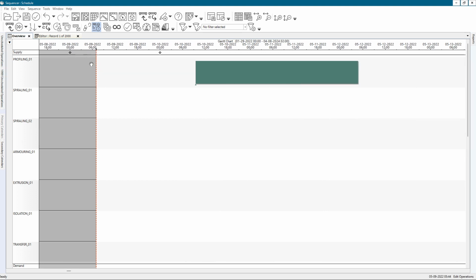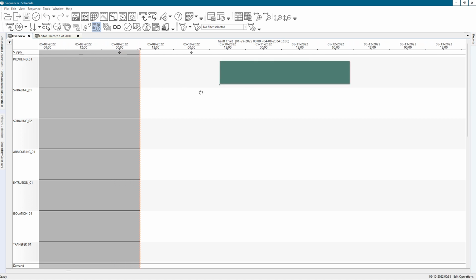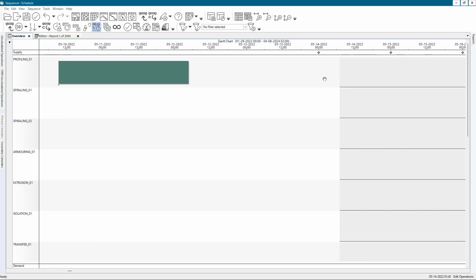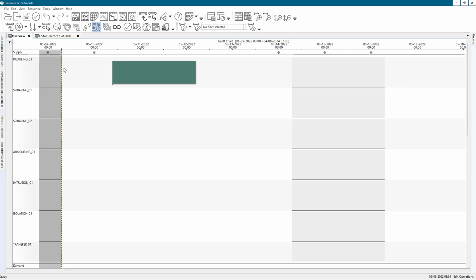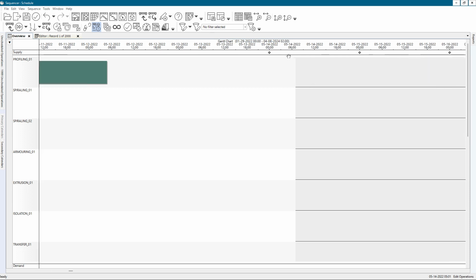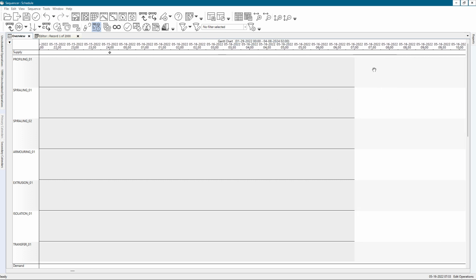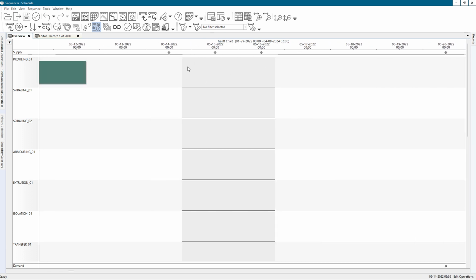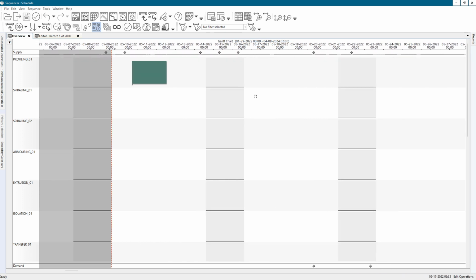Here, we have 7 a.m. in the morning of a Monday, May 9, until 7 a.m. in the morning of a Saturday, May 14 in this case. We have one calendar state that lasts for 5 days, which is on shift. Starting then at 7 a.m. on the Saturday and until the next Monday, 7 a.m., we have another calendar state which is off shift. And then it repeats, right?